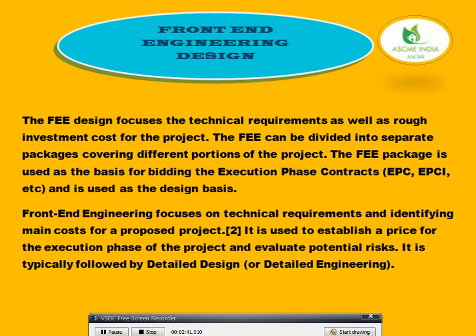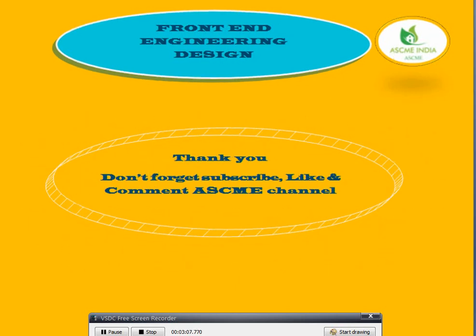In engineering, the focus is on the technical requirements and identifying costs for the project. It is used to establish the price for the execution phase of the project and for evaluating potential risks. It is followed by detailed design or detailed engineering.